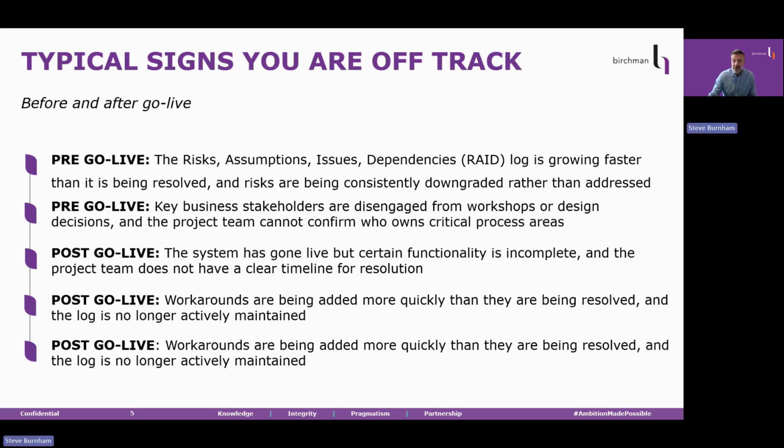When your implementation partner can't articulate a credible path forward, this is one of the most significant signs of all. When conversations about root cause have become circular, the recovery plan changes week to week, or the team is defending past decisions rather than solving current problems, the current dynamic will not produce a resolution. This is the point at which an independent view delivers the most value, not because it replaces the SI, but because it creates a basis for a clear decision about what needs to happen next.